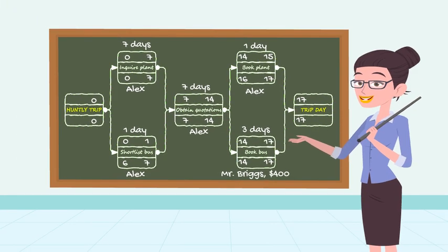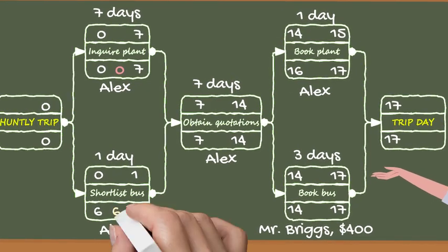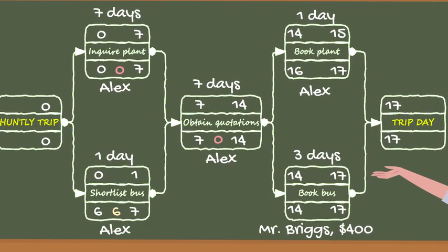One of the techniques is critical path method. It is used to estimate the minimum project duration by first calculating the early start, early finish, late start, and late finish dates for all activities. Here are our earliest and latest times for each activity. These are not necessarily the project schedule. Rather, they indicate the time periods within each activity that could be executed. The critical path method is used to calculate the amount of scheduling flexibility on network paths.